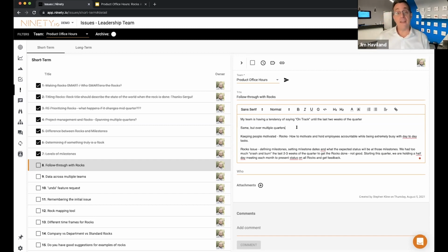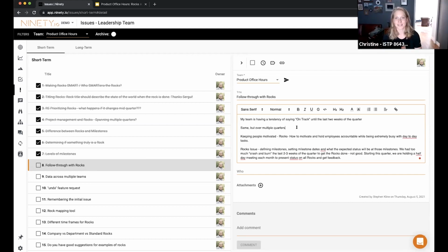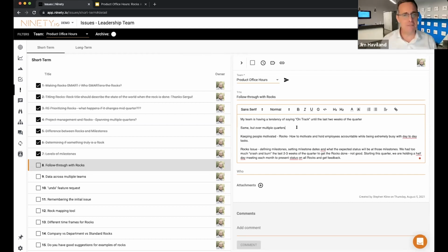But then I will come back with, we're going to pick a couple of your rocks. We're going to build all your milestones out so you can hold each other accountable. If you get 2 or 3 out, I'll watch them. One of the great things about being a coach on 90 is I can watch their rocks this next quarter. If they get 2 or 3 milestones back, I'm going, your rock's off track, my friend. I just set it off track. Yeah. So you better IDS this. You better figure out how to get it back on track, because you said it was a company rock.